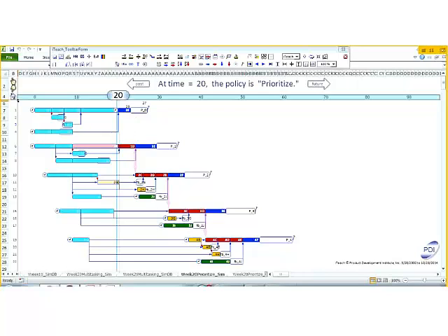So this is what you can do in your real system. In the real system, you want to prioritize the projects, come up with a list of priorities for the projects, and communicate that well so that everybody knows what the project priorities are. Then any work that's ongoing for future projects, you're essentially freezing. We're saying no work is going to proceed on project number 2 until about week 23. So essentially we're freezing these later projects in place, and we're going to finish project 1 and project 2 at a full level of effort.